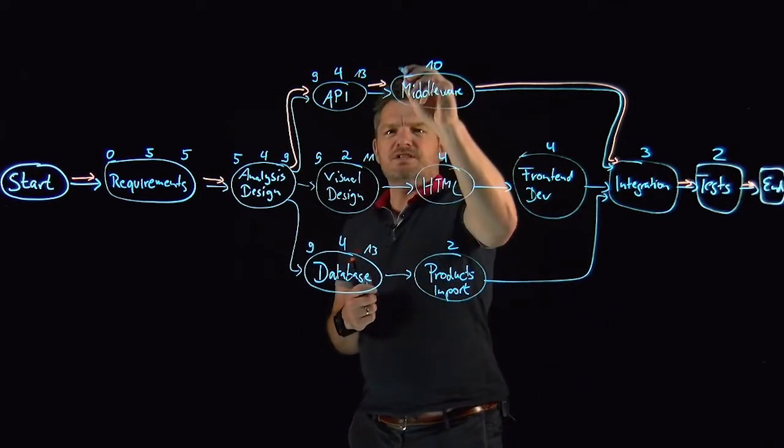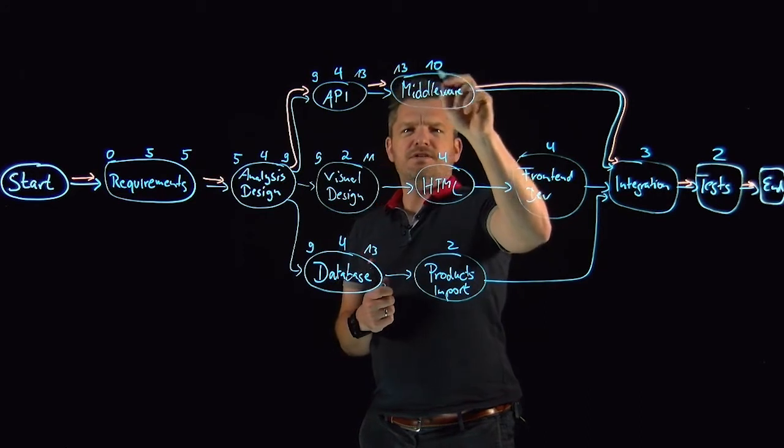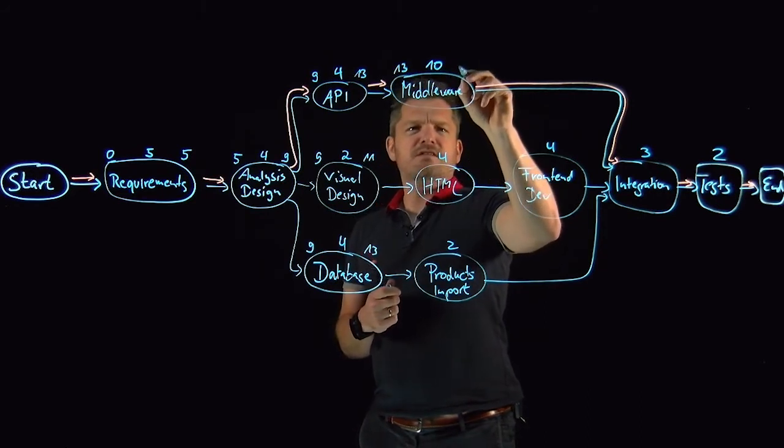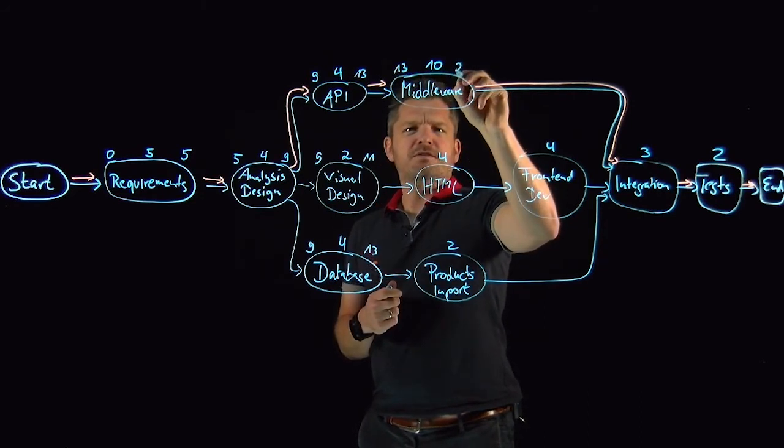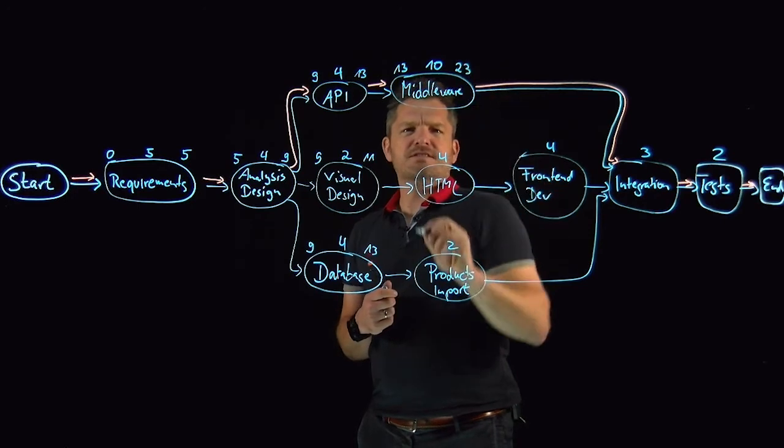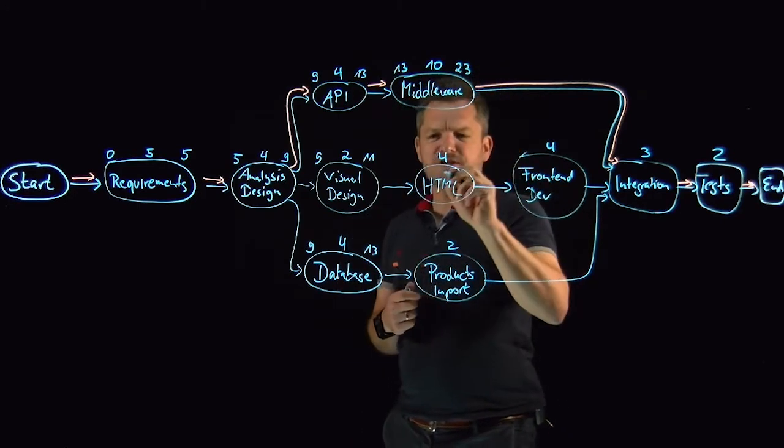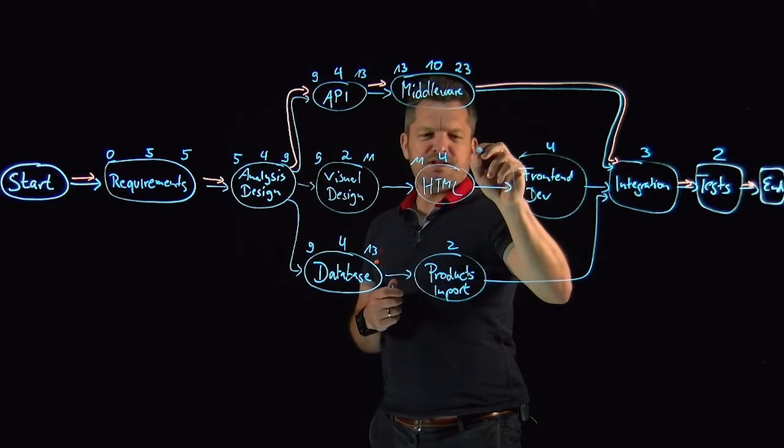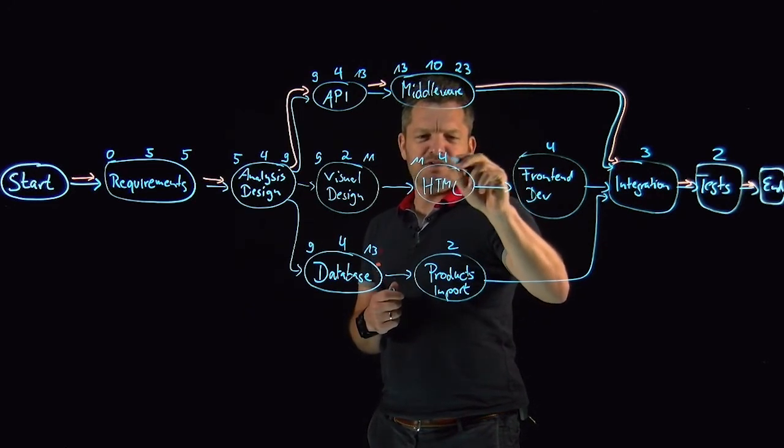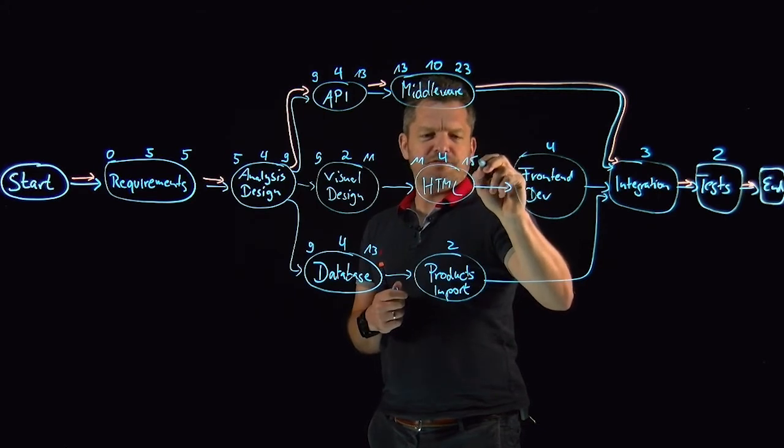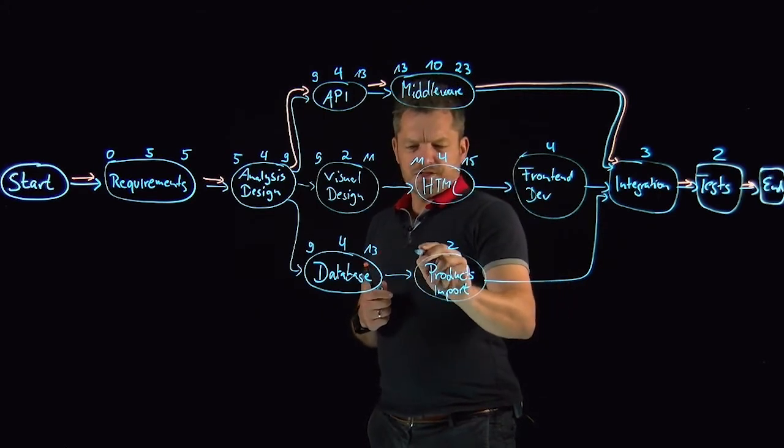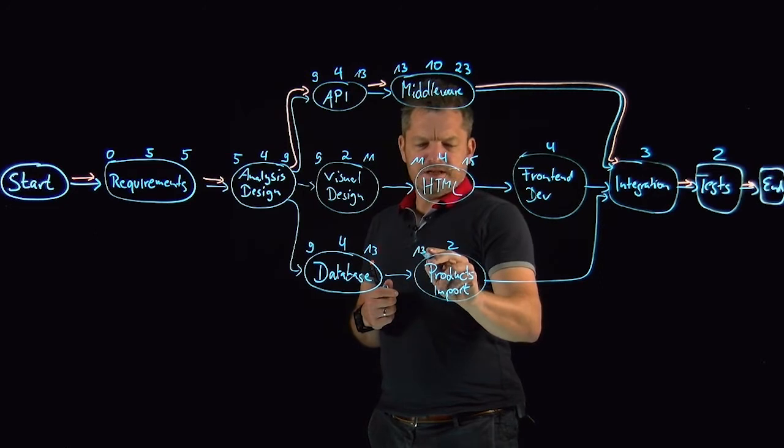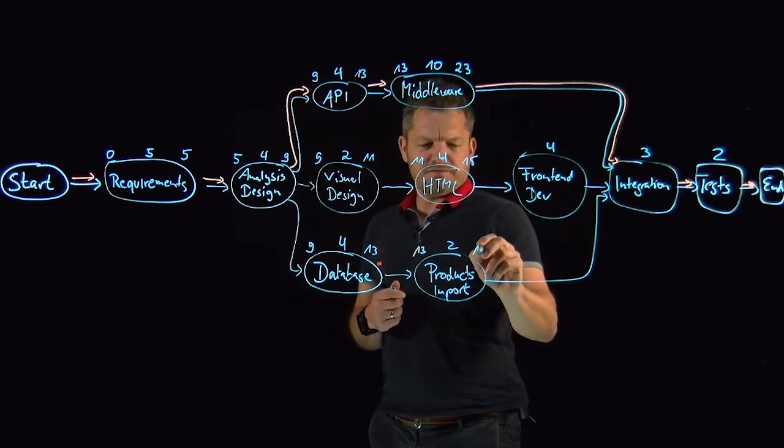We can take it again over. We have thirteen over here. We have thirteen over here. Thirteen plus ten we have twenty-three as earliest finish date. Take over eleven as earliest start for HTML plus four days of duration for this development. We have fifteen. Start at day thirteen plus two days. Fifteen days.